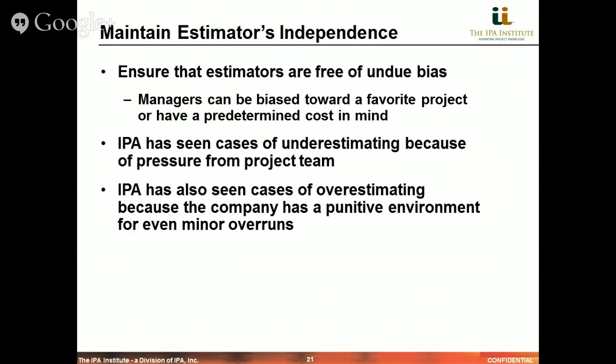Where what we're concerned about is quite often that the price or cost estimate is accurate, and lowballing it with a bias actually sets the project up for disappointment in terms of cost overrun and possibly not meeting the business objectives. And so we've also seen cases on the other side, where overestimation of a project cost happens because the project system is a punitive environment, in that any overruns whatsoever are met with very strong punishment or organizational disincentives.